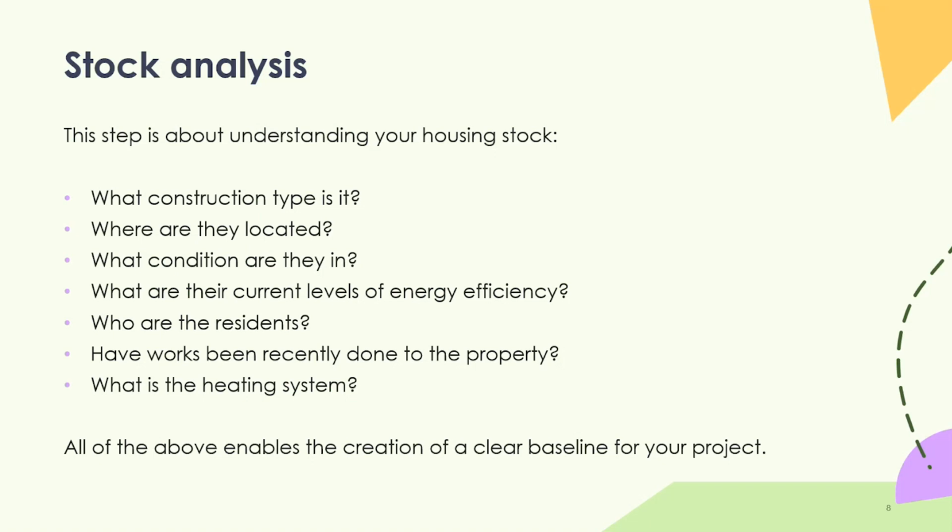Understanding the construction type will give you a really good background of, firstly, what kind of contractors you might need to install certain design measures. So if you need specialist EWI installers, if you need cavity wall installers, etc. Understanding the construction type will help you understand what kind of delivery you're going to need and what measures need to be installed. The other thing that's really good to consider is location.